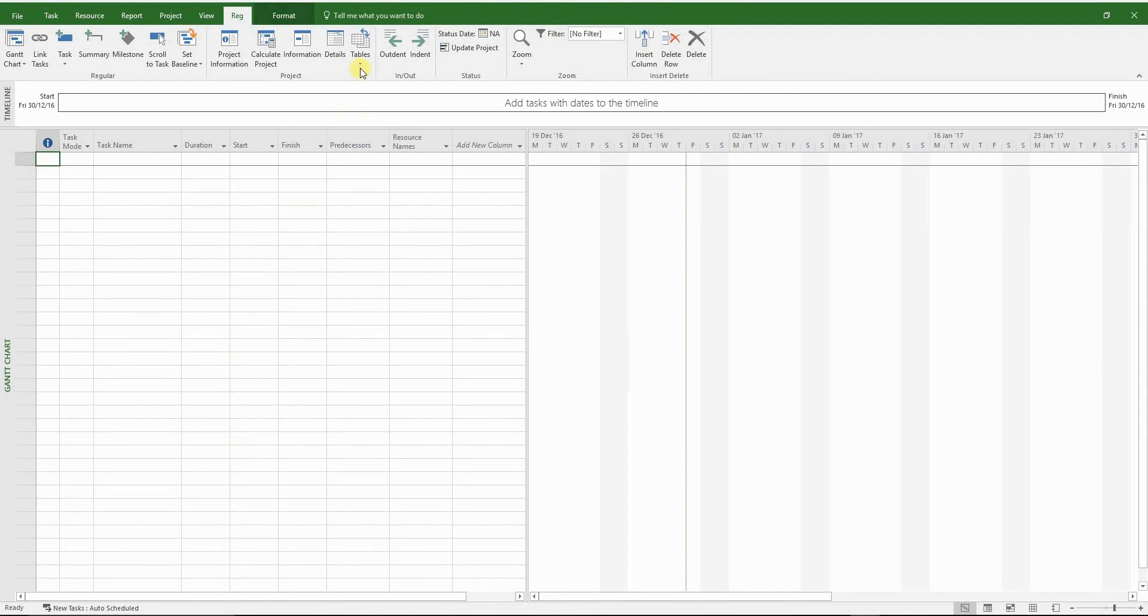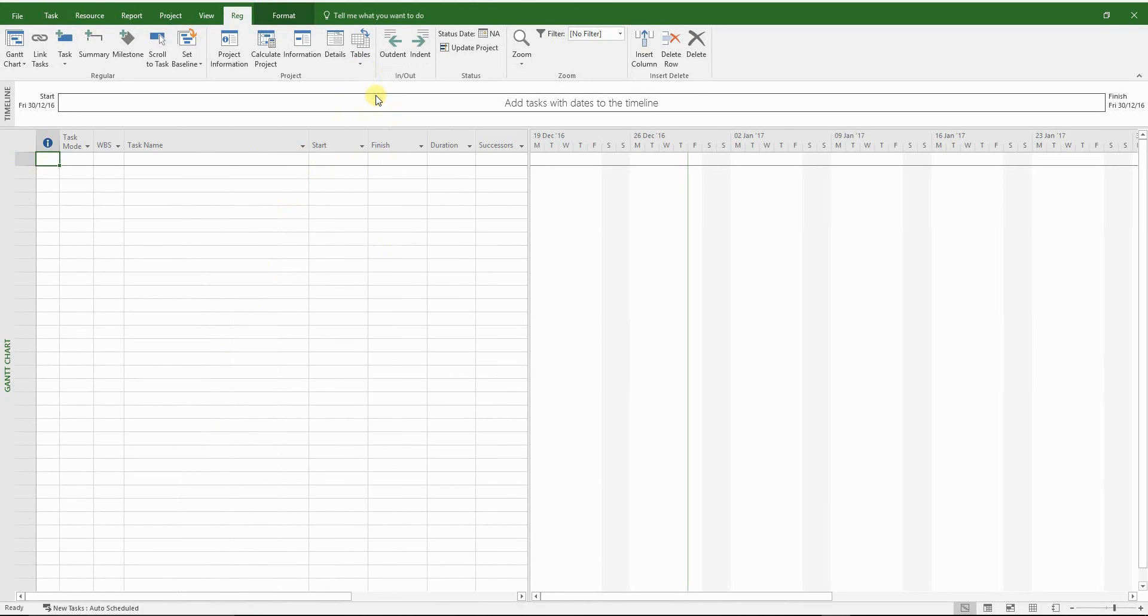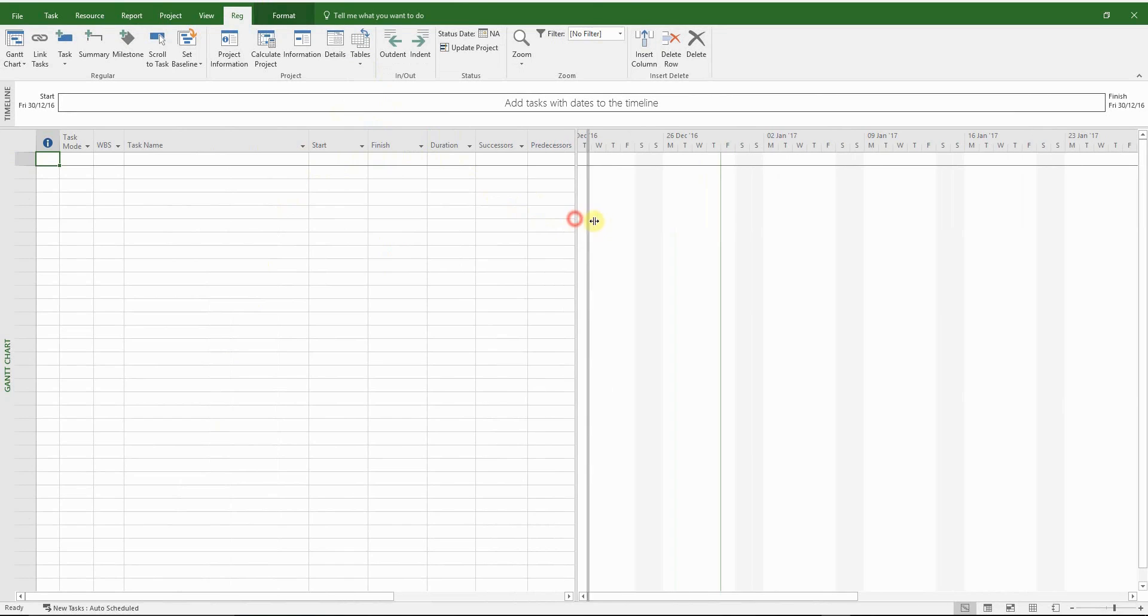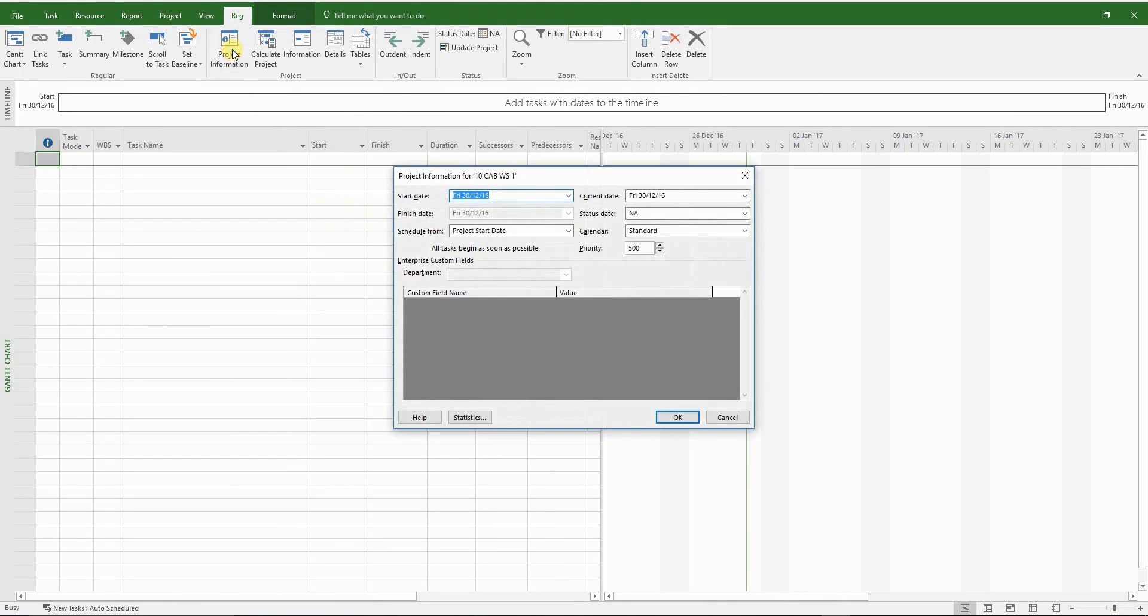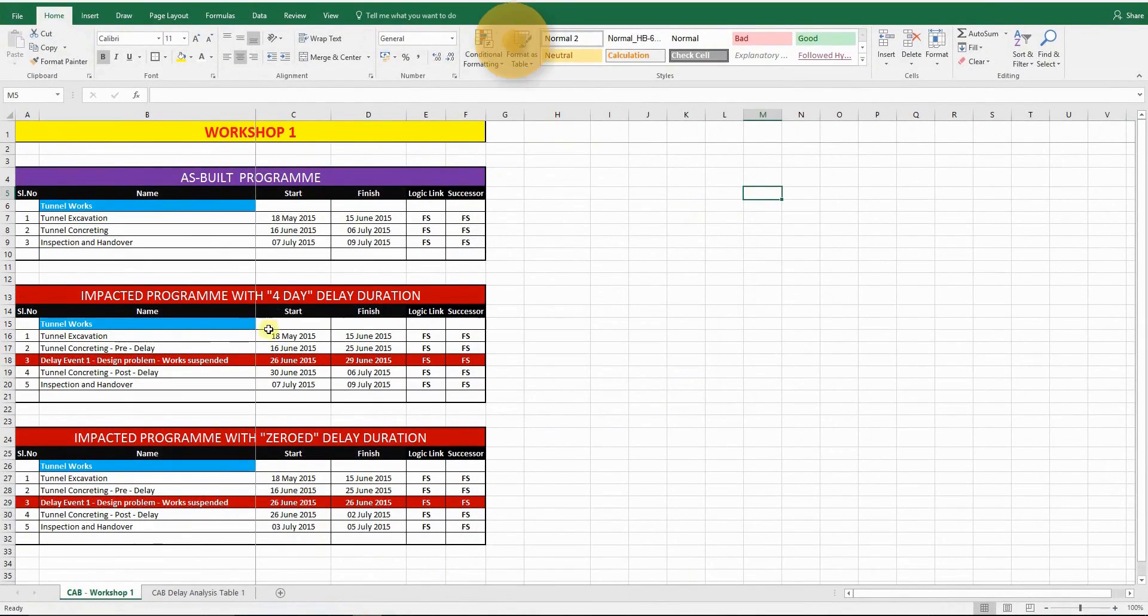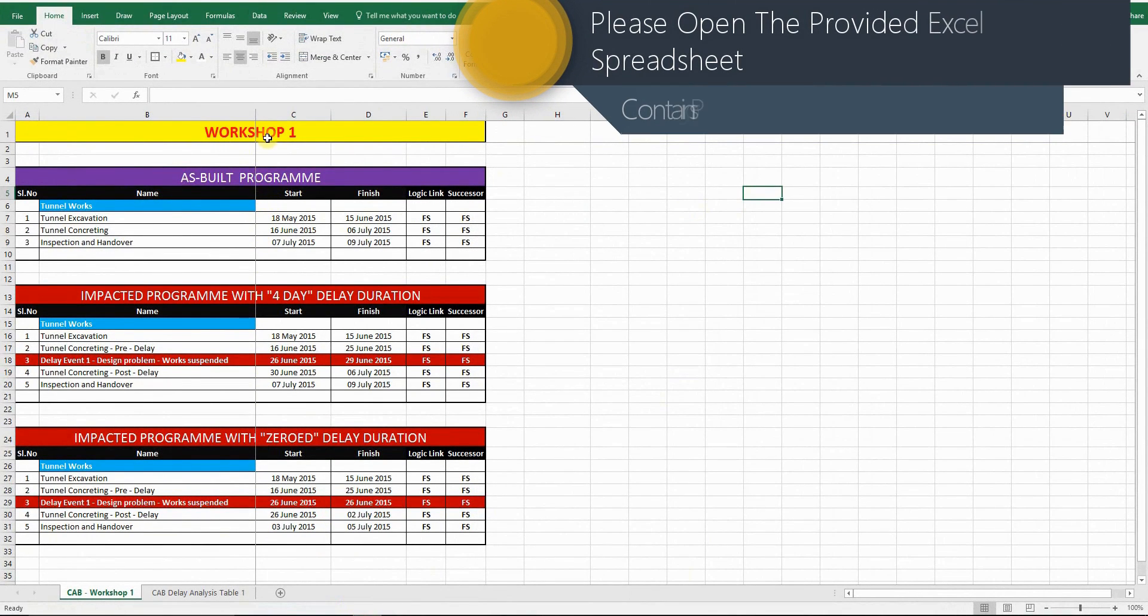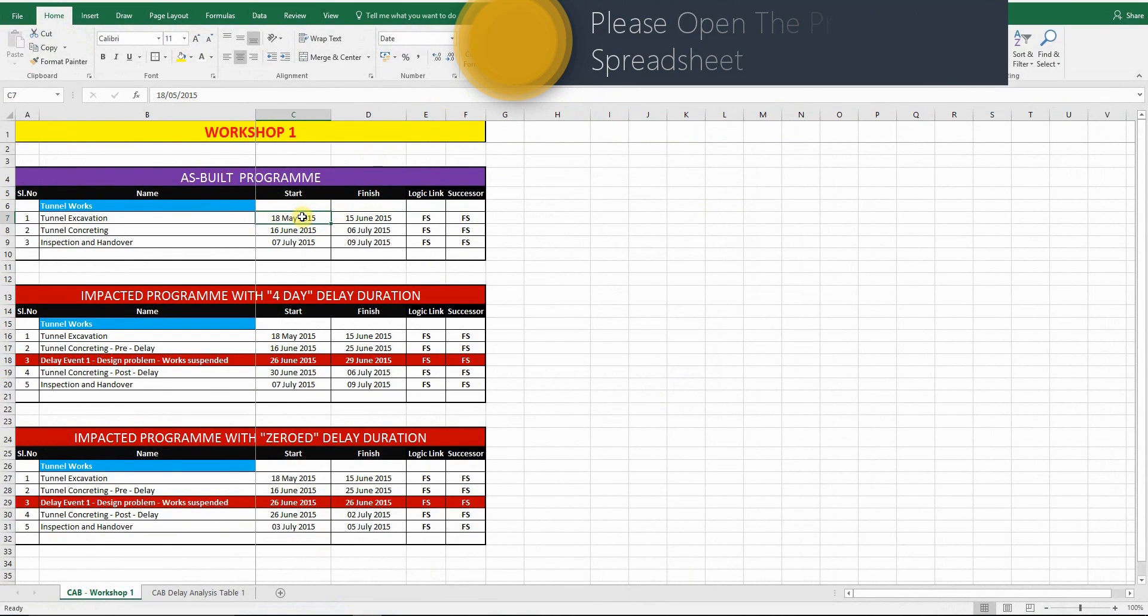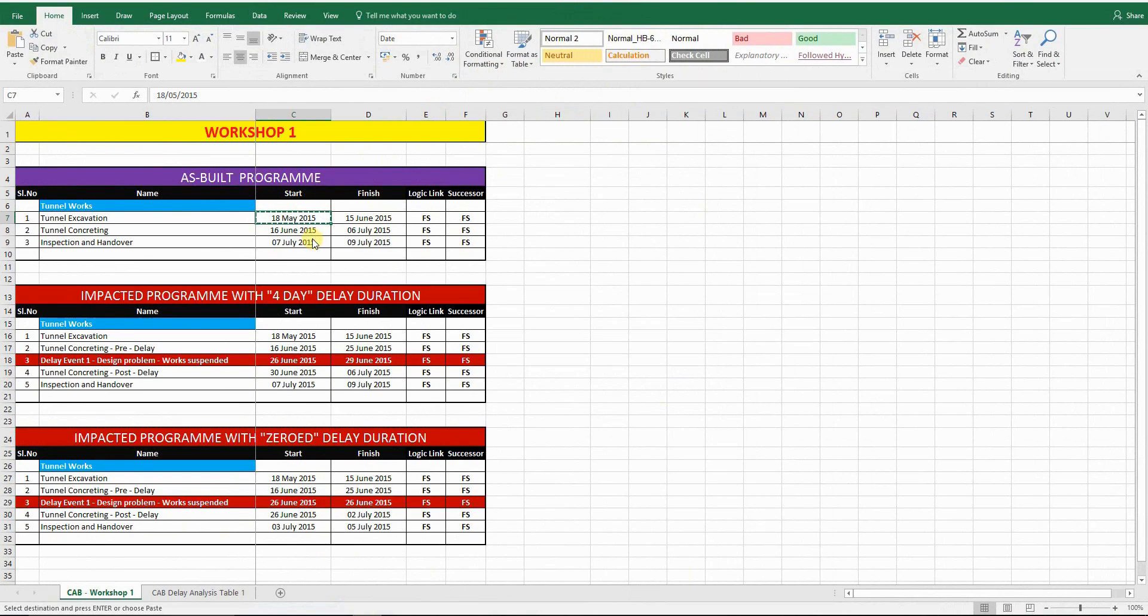So here we are in MS Project. I'm just going to load the table that I saved before. I'm going to update the project information, especially the start date I wanted to tie in with the date you have in Excel, which is the 18th of May 2015.